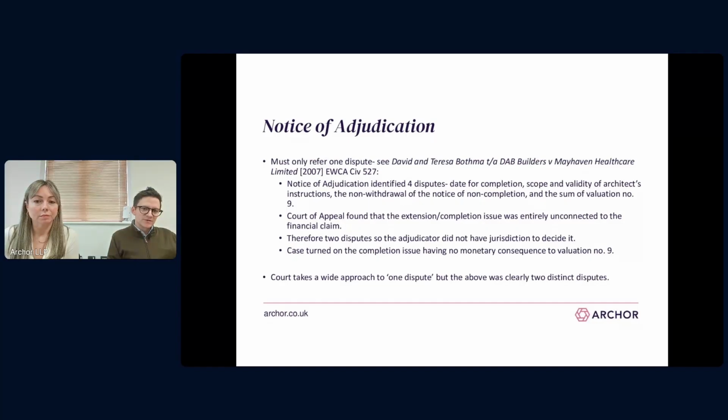There's some commentary on the screen about multiple disputes. This is something where there's been a recent trend by the court, but probably best to start where we were a few slides ago, in that you can only refer one dispute to an adjudication at one time. And generally speaking, a final account dispute with, say, multiple variations and loss and expense, that's one dispute with multiple sub-issues.